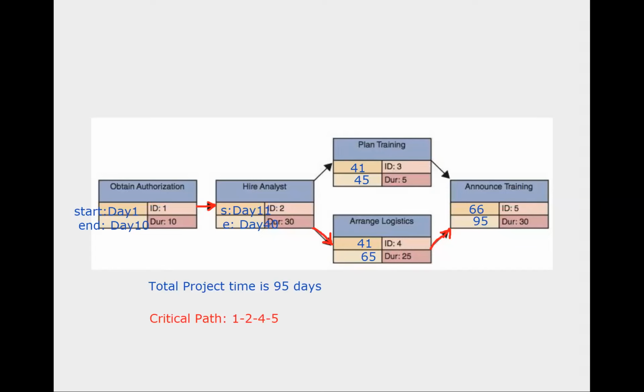How long can you delay? Because you know that you have to finish, the last possible date for this is 65, right? It should be 65. So to say 65, we have to start 61, right?